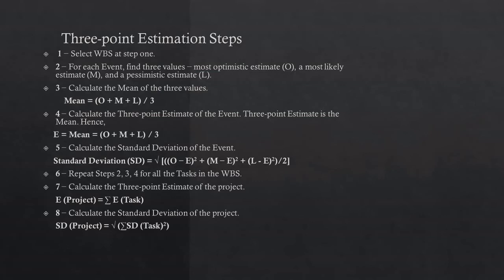Commonly, 95% confidence level is considered as a project estimation standard. More than that is okay, but less than that is not going to be acceptable.